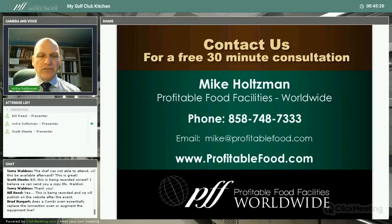A brand new kitchen with 100 pieces of equipment probably has 250 utilities that have to be coordinated with water and drain lines and sewer and all those things that occur with that. We've got to make sure those are right, and the utilities are in the right heights and the right locations. We've done this enough and understand it enough that we want to make sure that those are done for you.